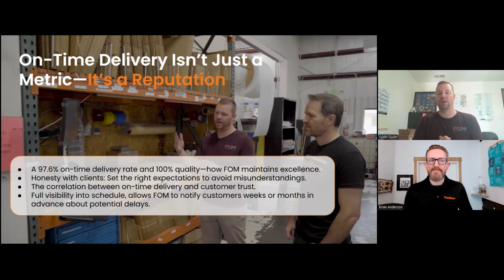And there's been many times where my employees will come and say, "Hey, we're not going to get this part out by the must leave by date. What should they just call the due date? We're not going to get this out by the due date." And then I'll go and look and say, "Okay, we've got 20 days planned for outside processing. Probably not going to take 20. We're okay. Continue on your path. We'll ship it 2 or 3 days late, and then we'll work with either shipping UPS or the outside processing vendor to make up those 3 days."